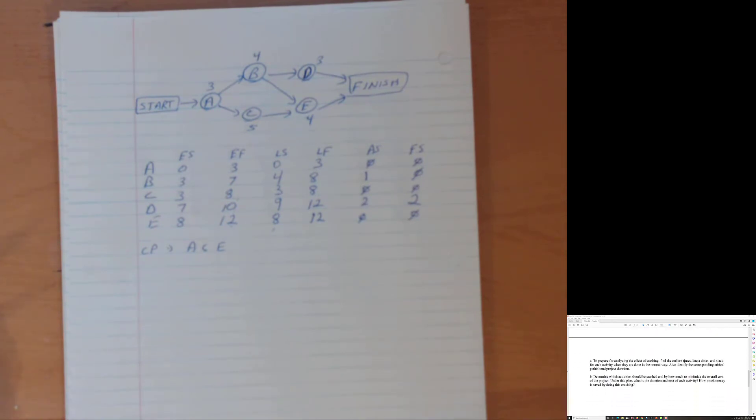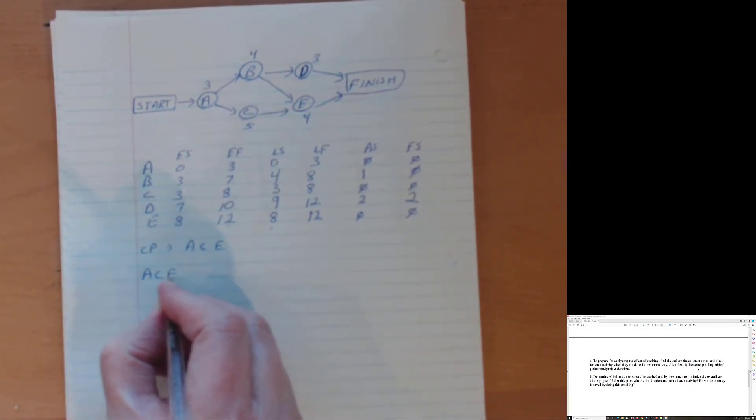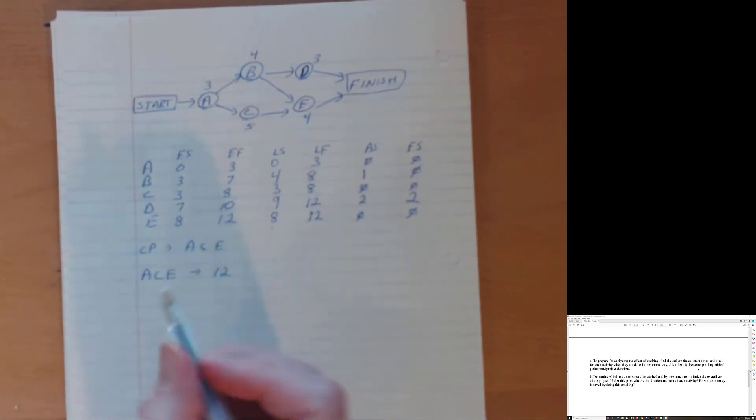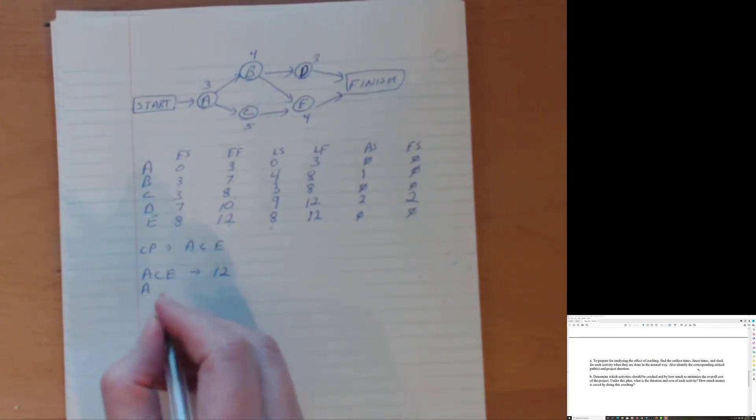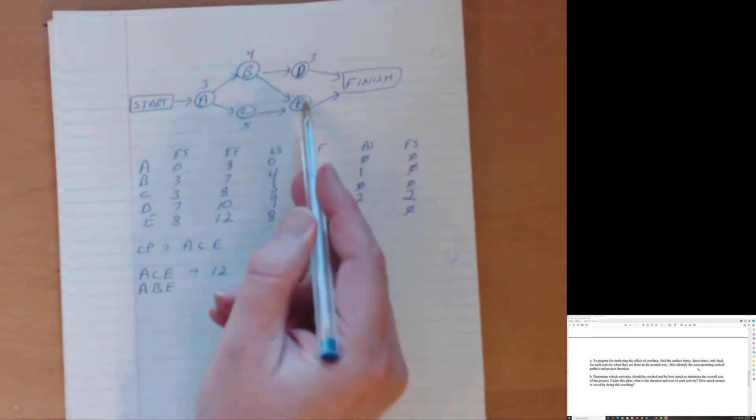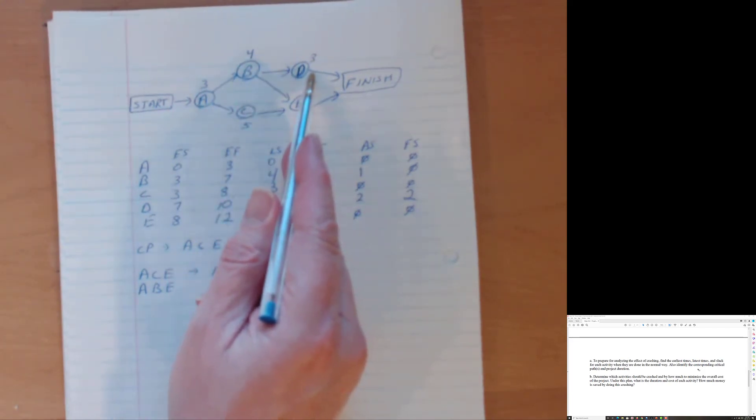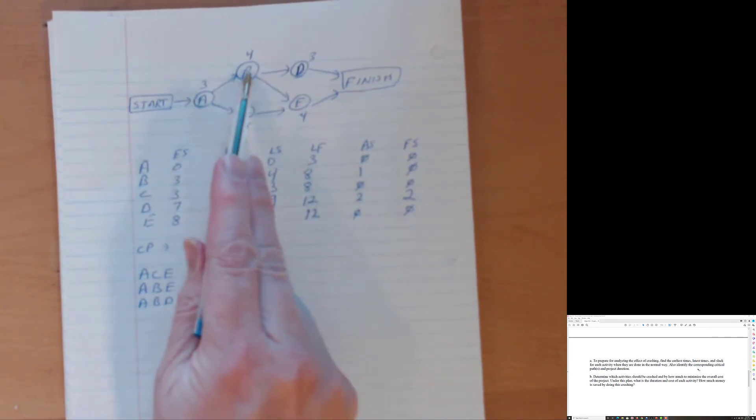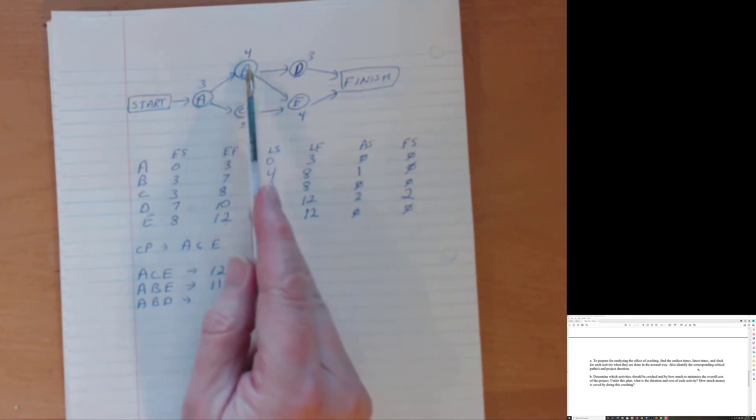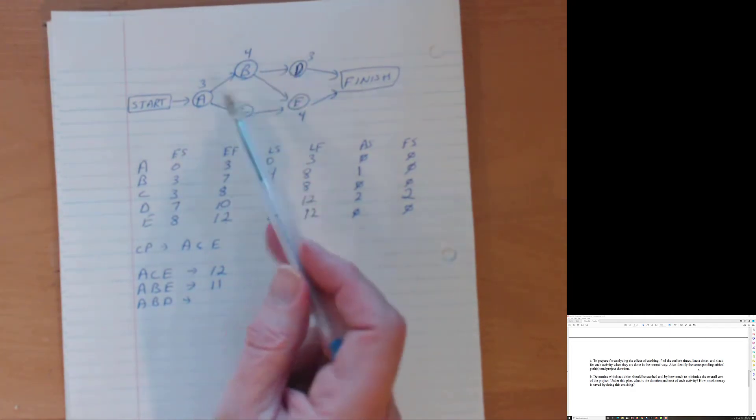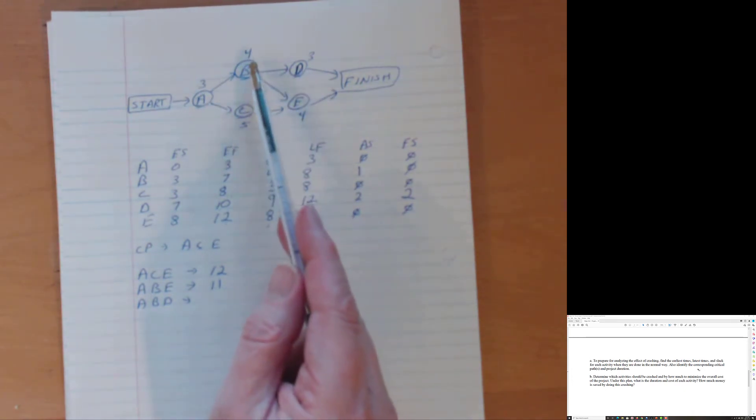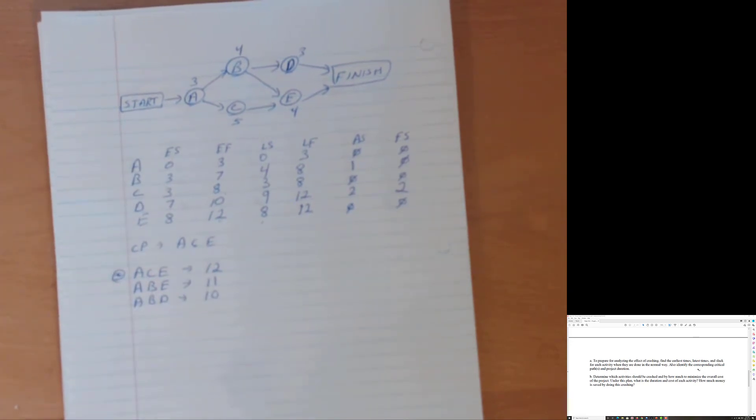So we found the earliest times, latest times slack for each activity and so on. We know what the critical path is, but let's look at the other pathways too. So we know that ACE takes 12 weeks. What are the other paths? Well, it's going to be an A, B, E, right? A, B, E. It's going to be A, B, D as in Delta. A, B, D. Now A, B, E, three plus four plus four. That's 11. A Bravo Delta, three plus four plus three. That's 10. So we've now confirmed that ACE is indeed the critical path. So we're going to zero in on activities along this critical path to begin. So we want to pick the cheapest of those.